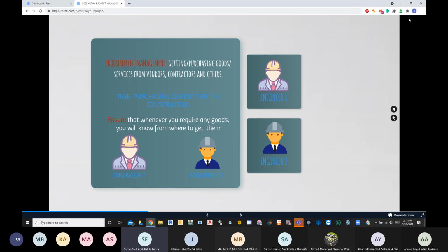Because he has different options, so I can choose the best for me according to my requirements. The options range will be more. Your answer is correct, but just to elaborate: having many options will, first, ensure a lesser price. Second, if something happens with the first supplier, you will not have a problem waiting for that supplier; rather, you can get the supply from somebody else.